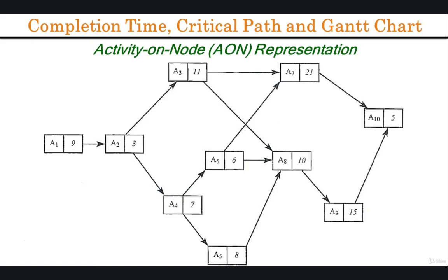It is intuitive that the project can be carried out in less than 95 days, the sum of the activity times. Some activities can be carried out in parallel, and so the 10 activities do not create a 10-person relay race. On the other hand, the degree to which we can execute the activities in parallel is limited by the dependency matrix. For example, activity A3 requires the completion of activity A2, which in turn requires the completion of activity A1.